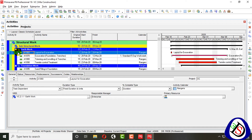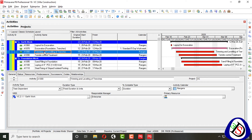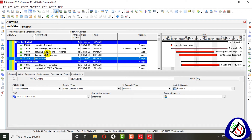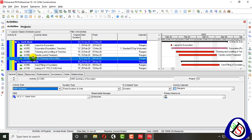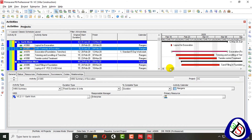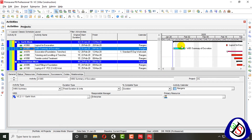The next activity type is WBS Summary. If I need a summary of excavation, trimming, and leveling of trenches, I can insert an activity anywhere in the project and name it 'Summary of Excavation.' I assign the activity type as WBS Summary. When I schedule it, the duration is automatically calculated.